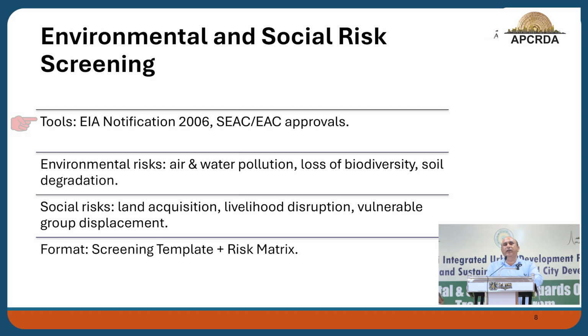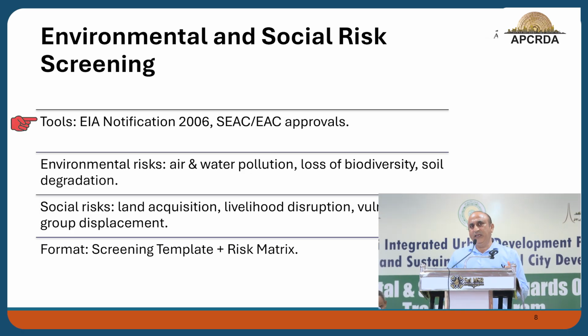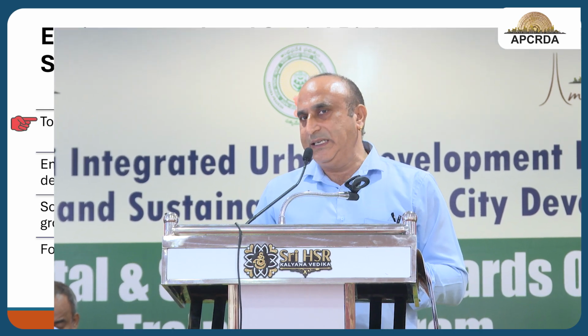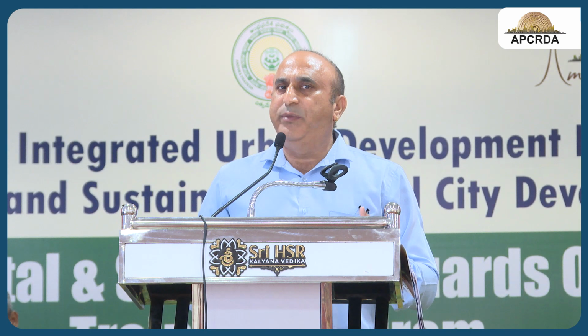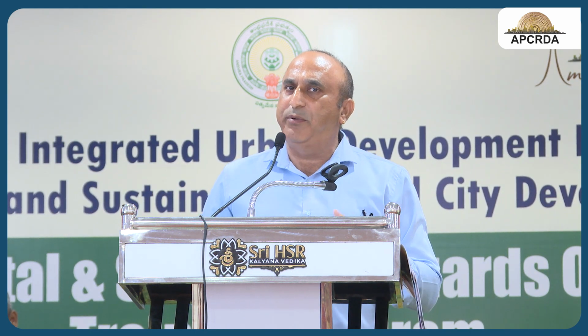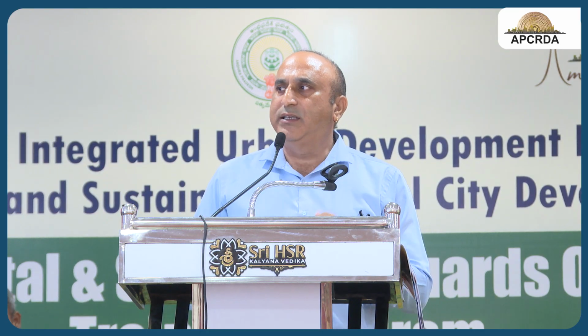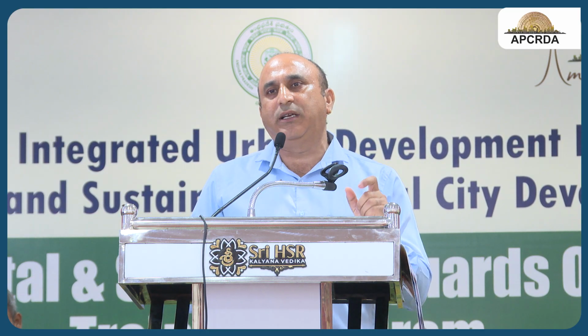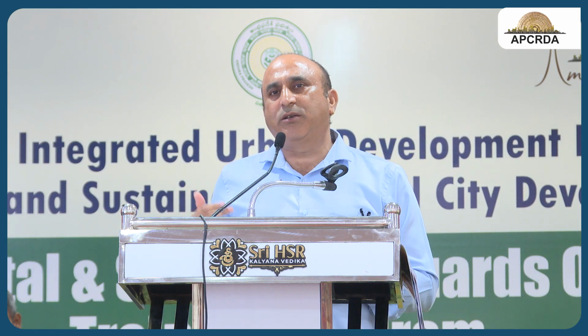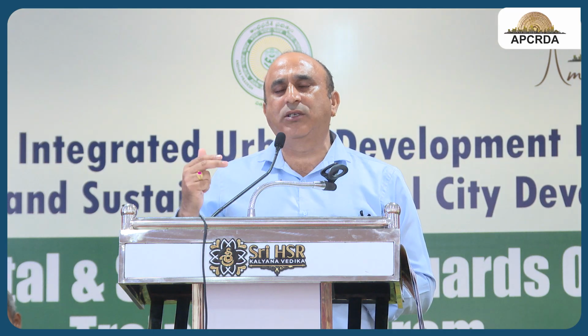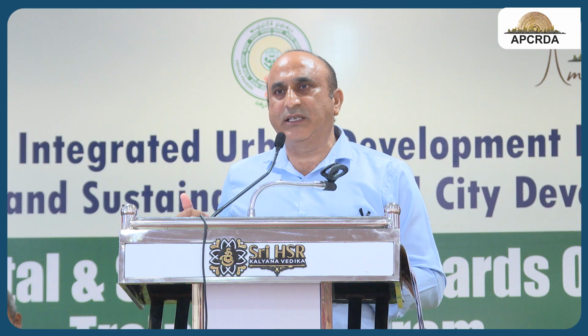Next please. Then environmental, social and risk assessment screening is basically a tool. EIA is the environmental impact assessment tool which governs and tells any organization, if you have to carry out any activity, what conditions in terms of legal or environmental safeguards they need to carry out. This comes under the EIA notification 2006. Till date we have many more notifications, but they are actually amendments. The basic notification, enlisted in 2006, talks primarily about 3 categories: screening, scoping, and methodology and further assessment.